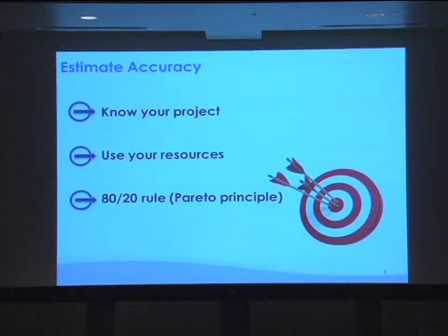What do I have? In the case of Washington State DOT, we've got a very robust unit bid analysis system of all of these years of history of all of the bid prices that have come in so that we can use. You saw early on that we have to start the estimating way back at the beginning. When it's way back there, we don't know how many tons of asphalt we're going to need. We don't know most things about our job. But all the way along, we need to focus on the things that matter, as we heard.